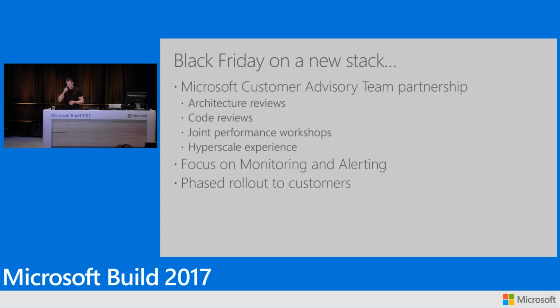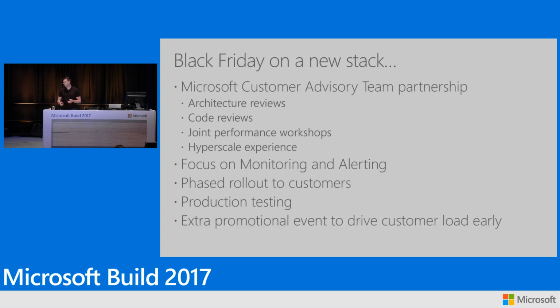Owen's going to touch on this in more detail, but the ability to roll out to real production and touch customers in a small percentage was vital to us. Getting that out there and engaging in real production testing gave us the insight to understand how the load operated really in the wild, and that allowed us to get a great deal of confidence so we could roll out wider. And finally, we were very fortunate in that our company was willing to understand and invest in the platform and understand how important it was for its future.